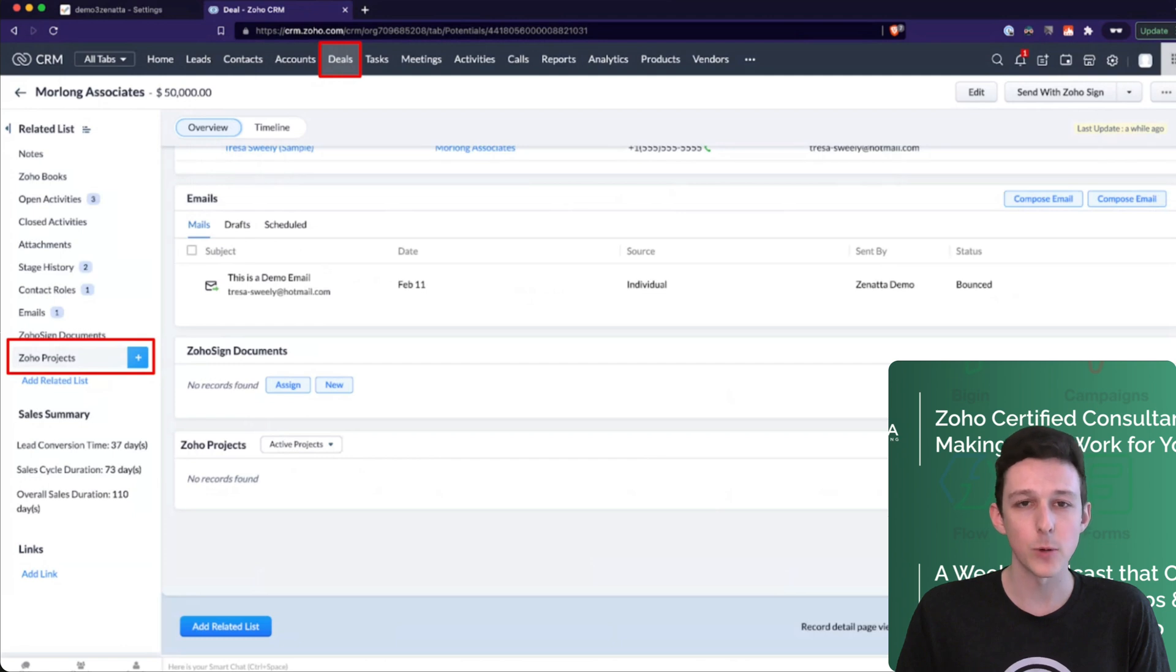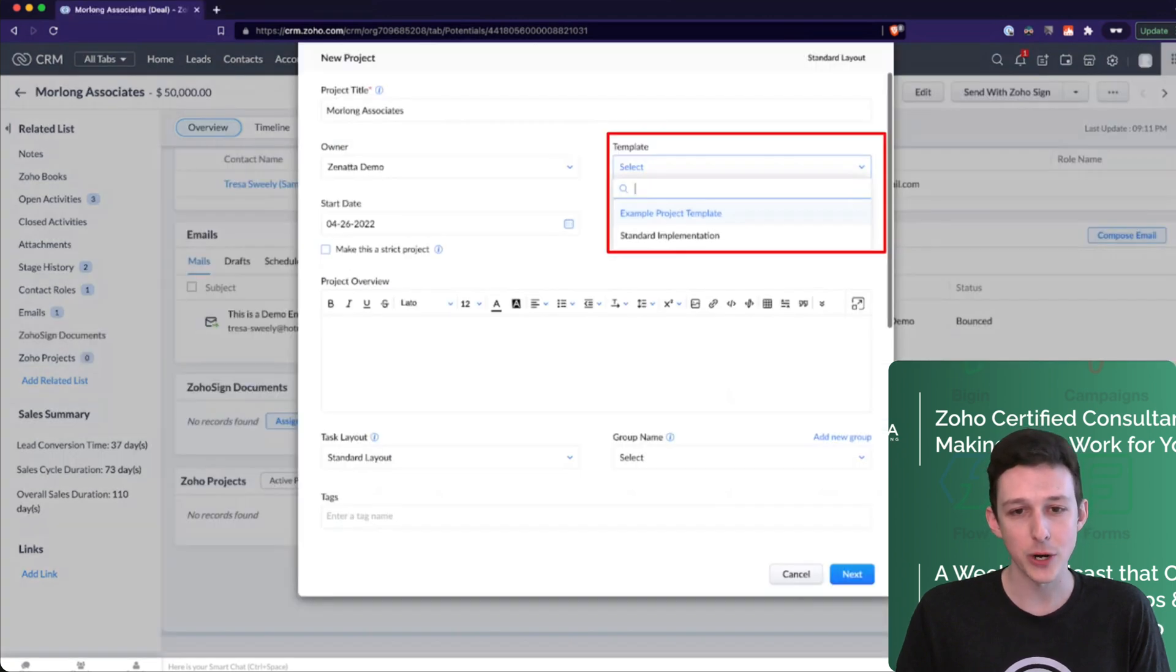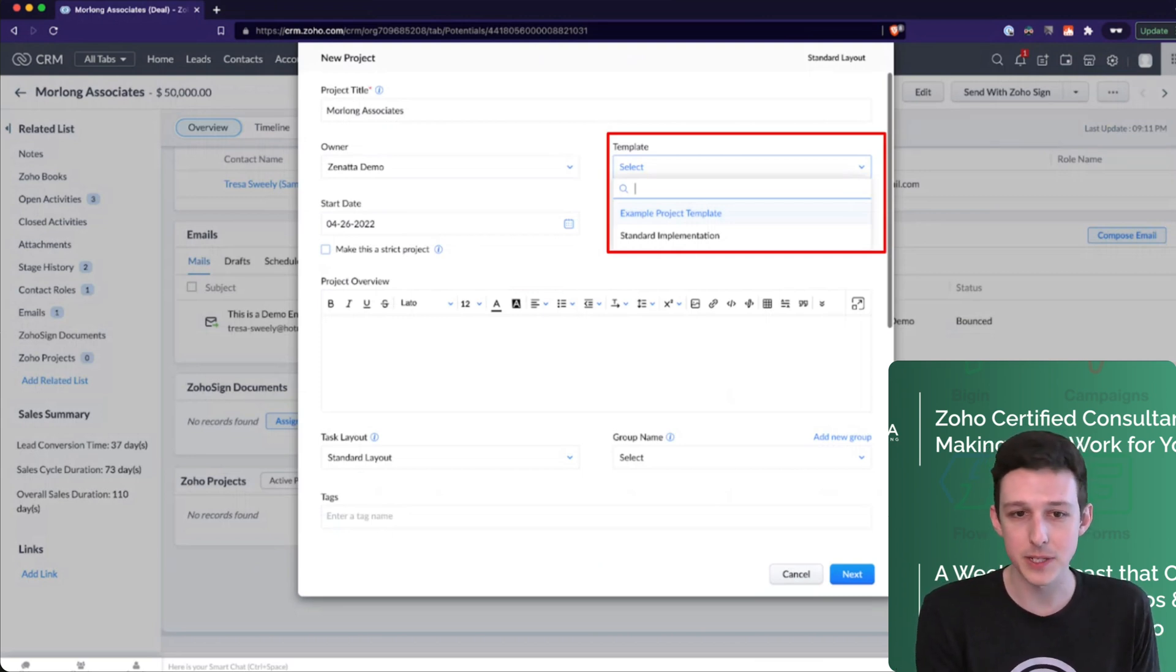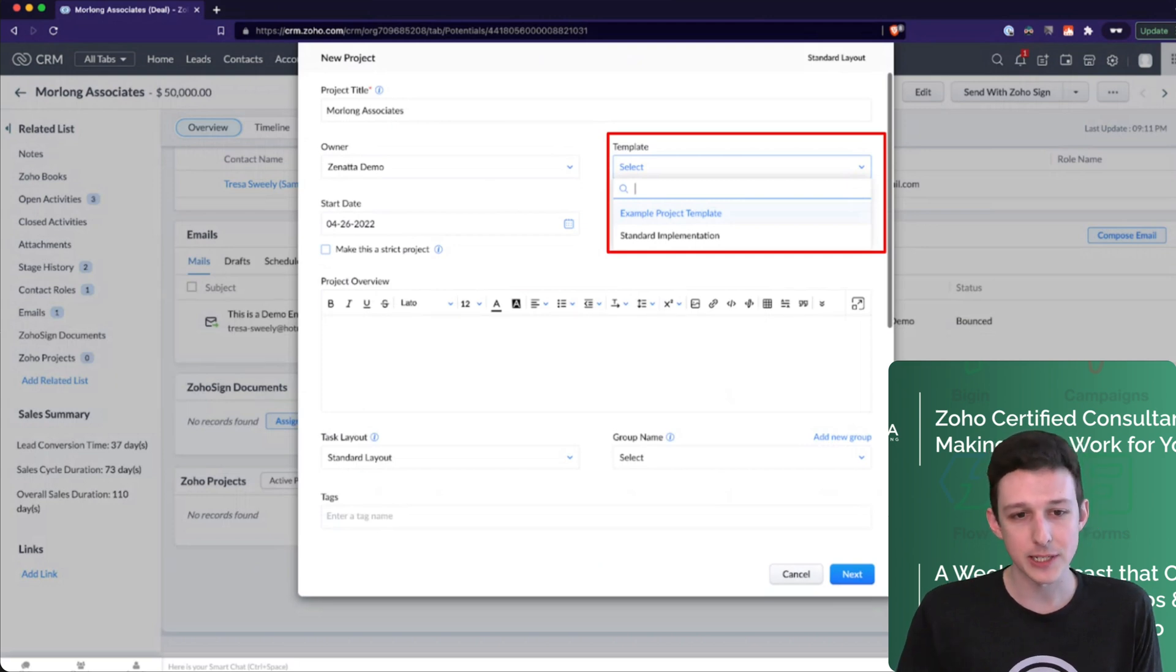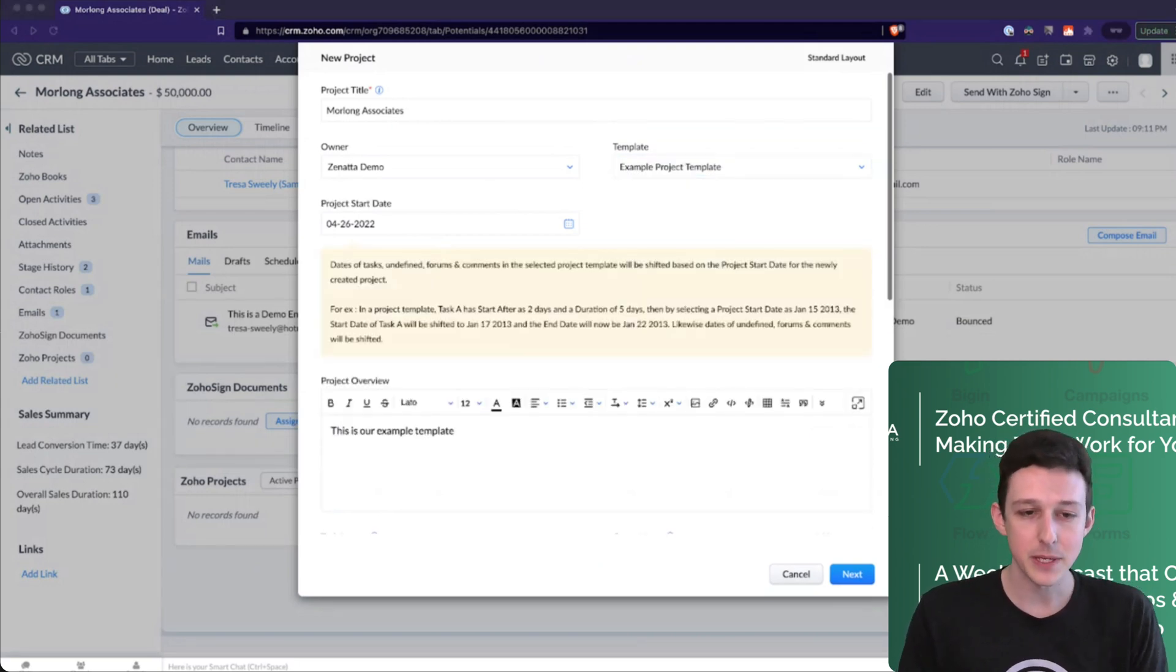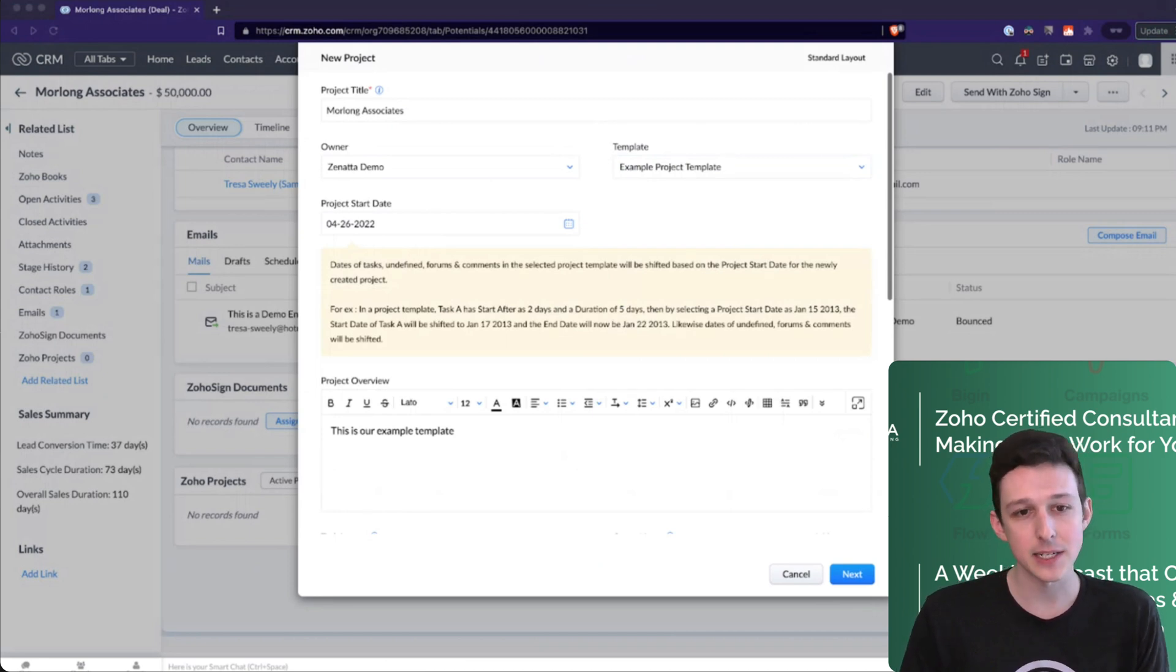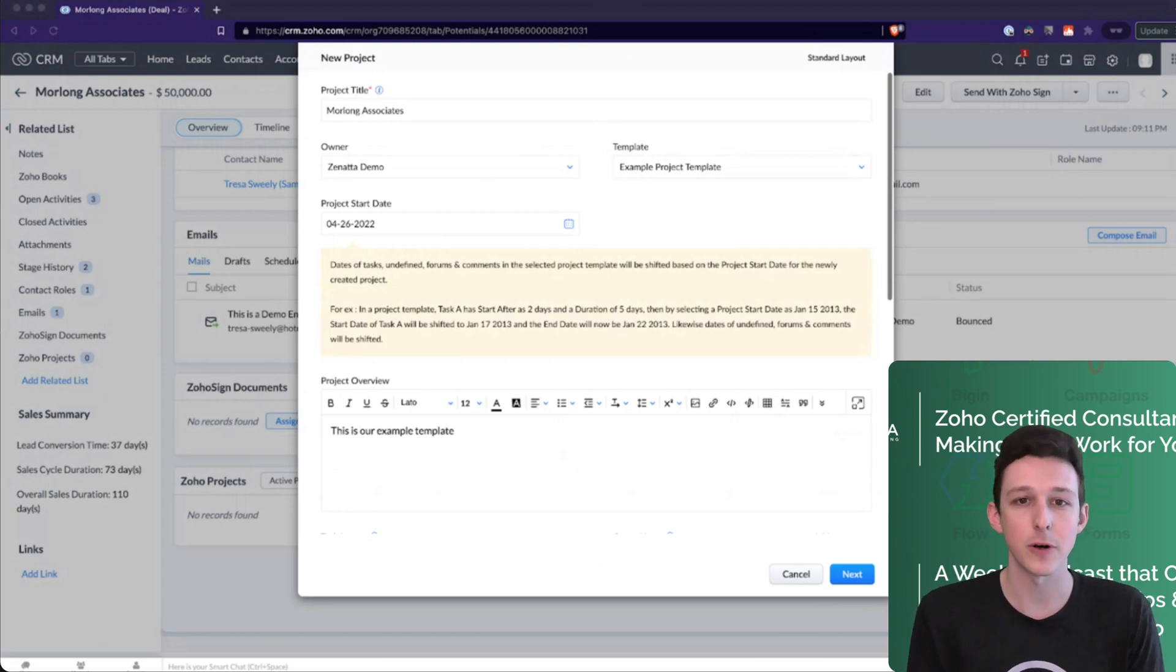I'll go ahead and add a new project. Here we can pick from those templates that we've created. So I'll choose our example project template. We'll also see that because the closing date from the deal was the 26th, that set itself as the project start date and will be the day zero for all those task calculations.